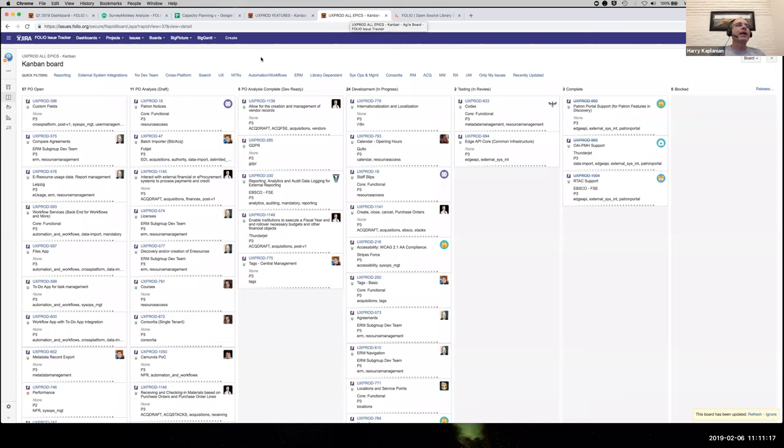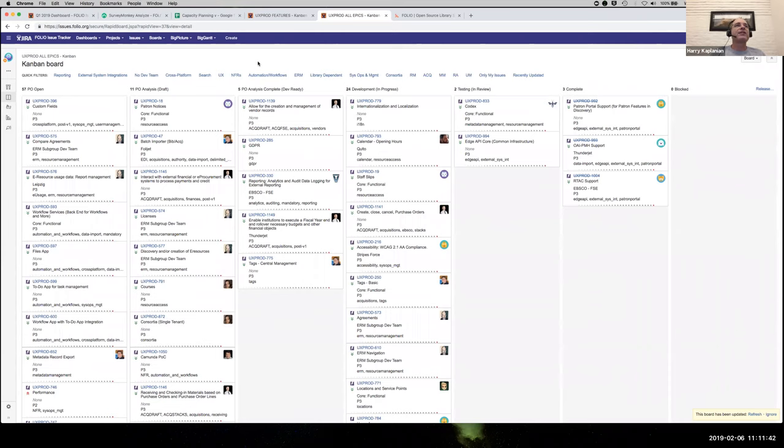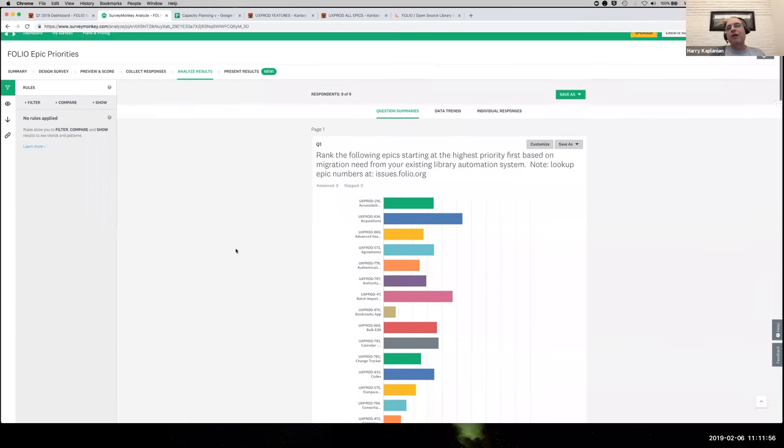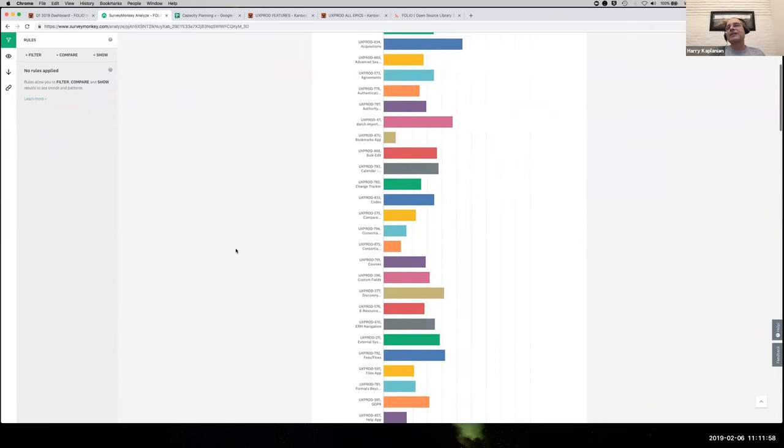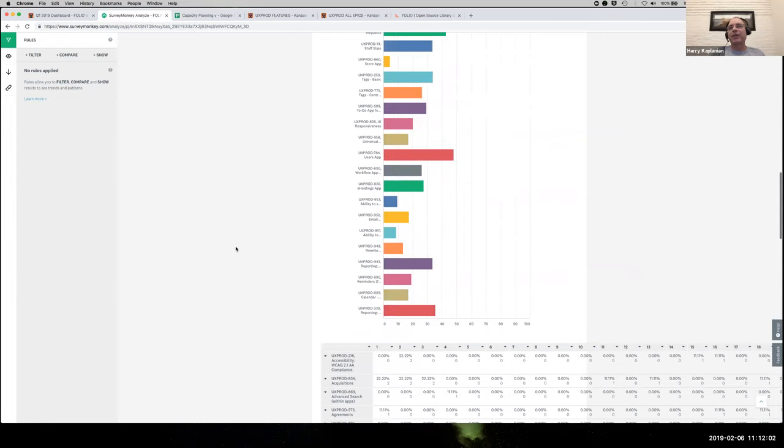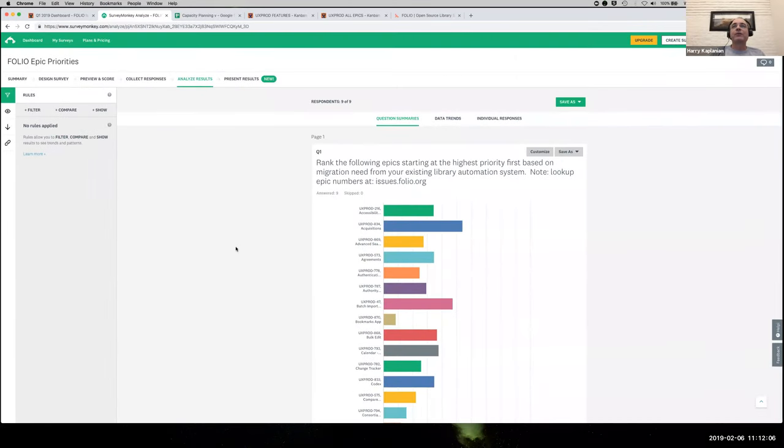And quite a long time ago, we all got together and built what amounted to a backlog of what we call epics. And these are very high level features, really broad swaths of functionality or maybe even better domains of expertise that occur in the library. And what we've done is we've identified these and prioritized these. However, prioritizing, especially with a fairly substantial group of libraries is not always the easiest thing to do in the world. And so, the way we go about doing it is we actually carry out surveys. And so, here's an example of a survey that was carried out in SurveyMonkey.